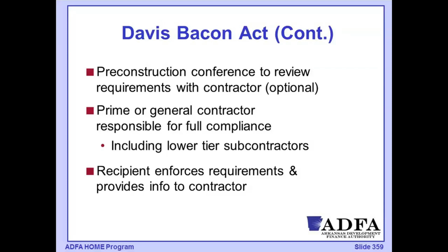They also will be required to collect those certified payrolls from all the subcontractors. This will be throughout the life of the project, so there may be a whole mix of subcontractors at different phases within that construction project.